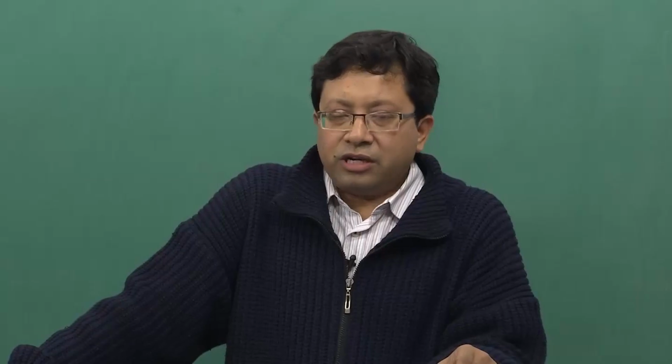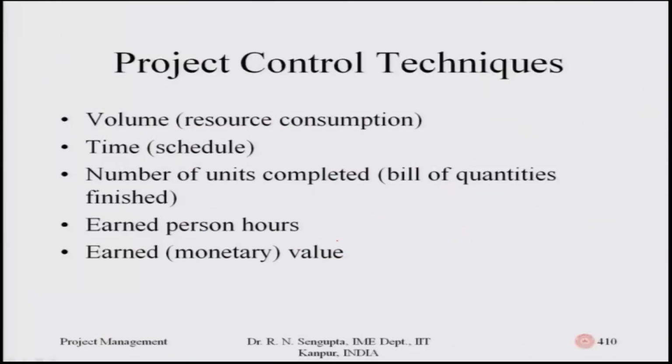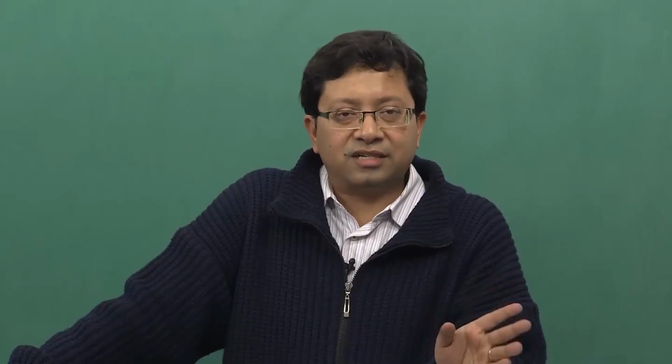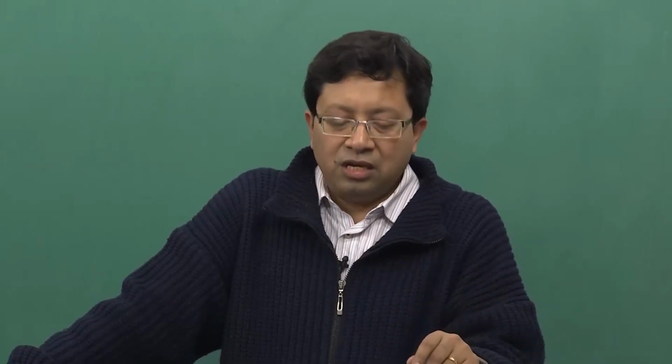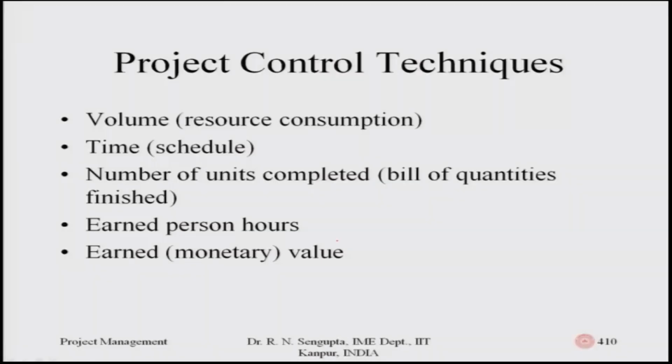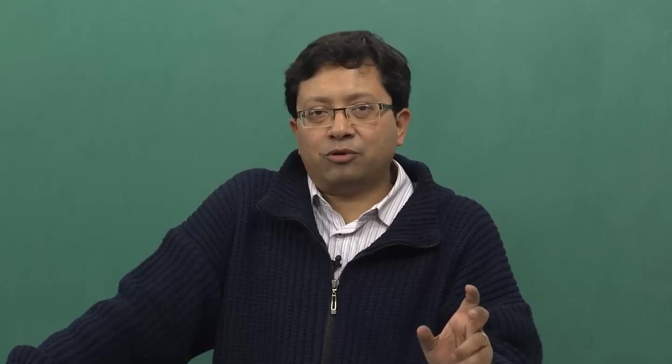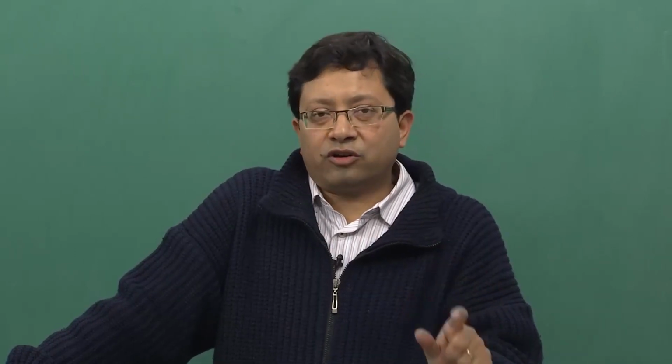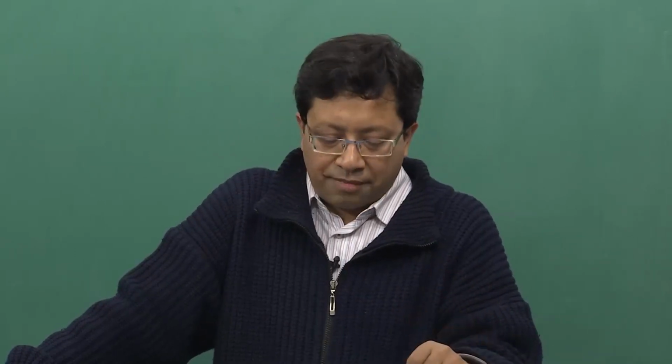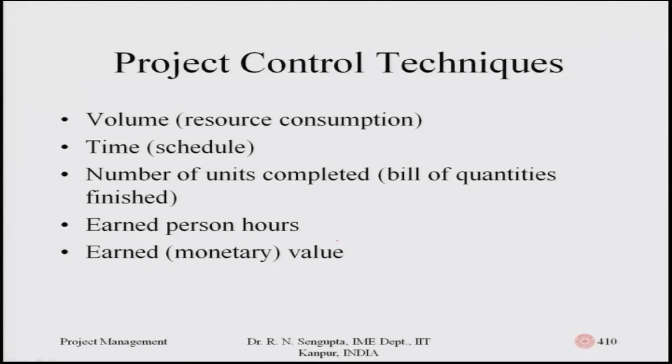For project controlling techniques, you will consider the volume and total resource consumption, and how resource scheduling and resource leveling should be done, using the concepts of early start, early finish, late start, and late finish. You will consider the time and the schedule, the critical path, and how it affects all the activities on the critical path, so that you can take a collective decision to reduce the number of days with respect to the cost. Cost will increase, but on the other hand days will decrease. So, you have to make a balance.